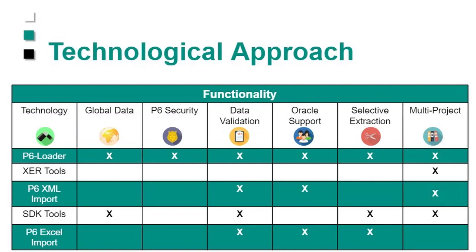To replace the SDK, Oracle came out with a P6 Excel import utility. It does validate data, is supported by Oracle, and allows selective extraction and loading. But it doesn't let you access global data — basically project data and resources only — and it has no security around it, so if you have access to use it, you have access to do everything.